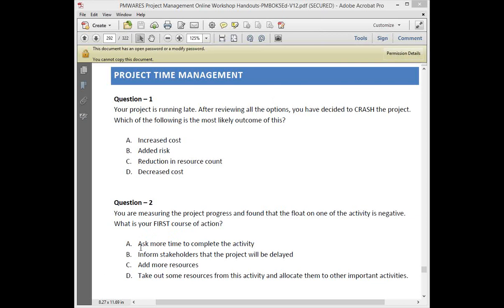After analysis, we understood that the project is getting delayed. So the very first thing I'll do, I'll inform the stakeholder, see, this is getting delayed. Now if we have to finish on a particular date, I need to add more resources. Because we need to add more resources, the cost will be there. So I need your approval. So first I will inform the stakeholder with your analysis, and then you go for adding the resource.